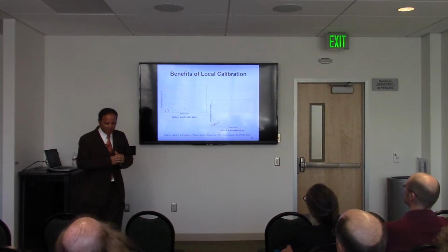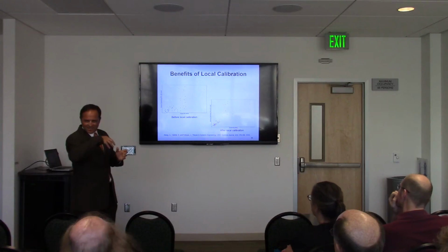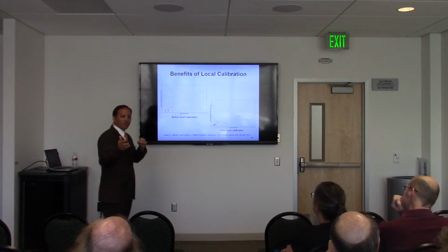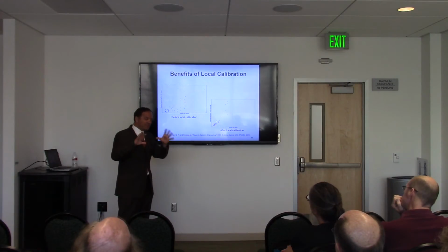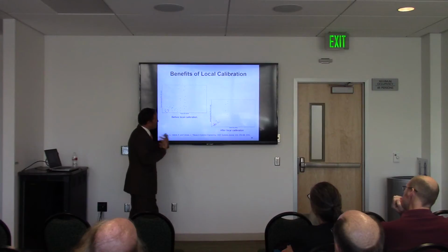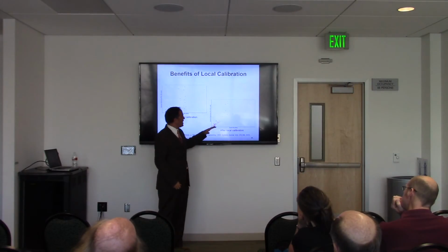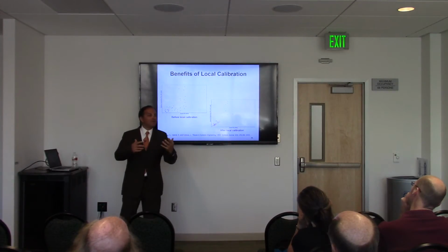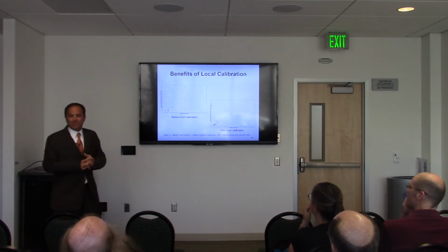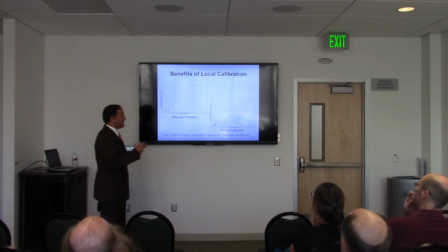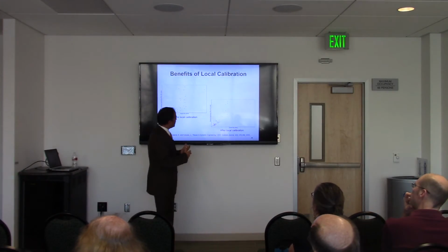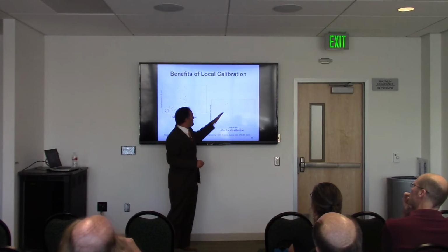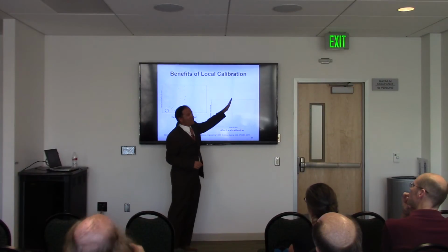So what we do is we calibrate the model, again, using half the data to train it, and then half the data to validate it. That's not a hard rule. We sometimes go 75%, 25%, depending on how much data we have. And then once we fine-tune the model, we throw in a similar data set, and the calibrated model looks a little bit more reliable. I'll use that word. It's not a great predictor, right? But at least we see some uniformity. We see some nonlinearity, though. Todd, I'm coming back to that, right? You see that there's some nonlinearity in that.